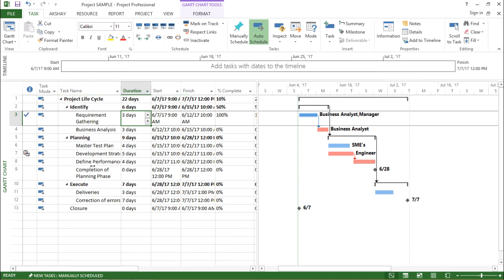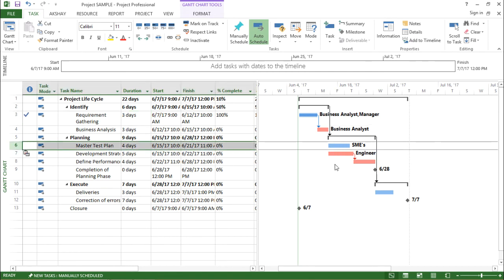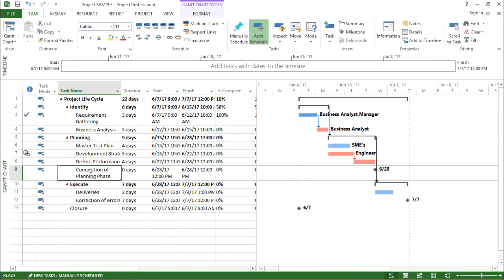I have a table on the left-hand side. On the right-hand side I can see the Gantt chart with red bars representing critical activities and blue horizontal bars representing non-critical activities. This is the default view with all the required details. That was about the Gantt chart view.